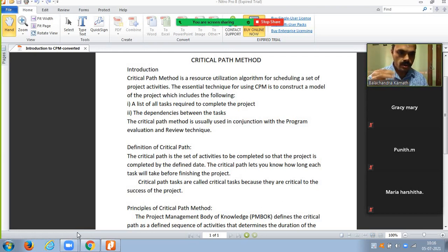Okay, lay down the metro track. And then the fifth step could be to construct the railway stations. These are all interrelated. It starts with land acquisition, and then once land is acquired, or an MOU is signed with the parties affected by the metro construction, because some buildings might have to be demolished or something might have to be done. So that conversation would be the first step.